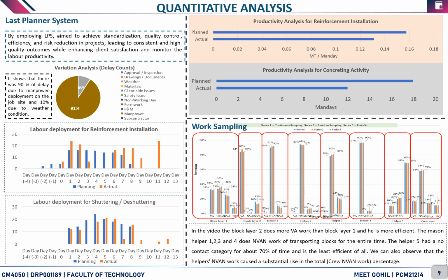Talking about some of the delta, the lack of communication between subcontractors posed challenges during the implementation of LPS. The top management's ability to effectively implement LPS on the project was limited, primarily due to their lack of influence over all parties.